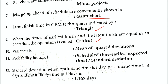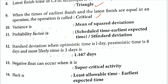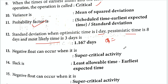Variance is the square of standard deviation. The probability factor is: scheduled time minus earliest expected time, divided by standard deviation. The standard deviation formula is: pessimistic time minus optimistic time, divided by 6. For example, if pessimistic time is 8 and optimistic time is 1: standard deviation = (8 − 1) / 6 = 7/6 = 1.167 days.